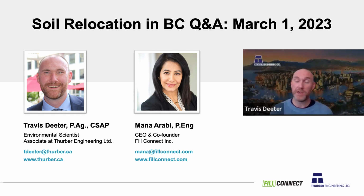However, even if you've got a Schedule 2 use site and you apply for a subdivision permit, that means you're now filing a site disclosure statement. That SDS is going to identify a Schedule 2 use and it will be frozen. So you will not be allowed to subdivide your property until you go through the formal contaminated sites process. So, I don't see that being a realistic avenue to try and reduce your soil relocation commitments or requirements.